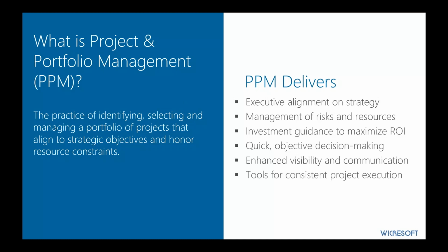Well, PPM is clearly defined as the practice of identifying, selecting, and managing a portfolio of projects that align to strategic objectives and honor budget and resource constraints. So this means end-to-end lifecycle management of projects from their inception as an idea or proposal right through to the successful delivery of the project's stated outcomes and deliverables. It's the capture of the anticipated costs and return on investment in a business case and the subsequent prioritization and selection of a portfolio of projects to be delivered. Finally, the delivery of the projects with clear visibility and communication throughout the delivery process.